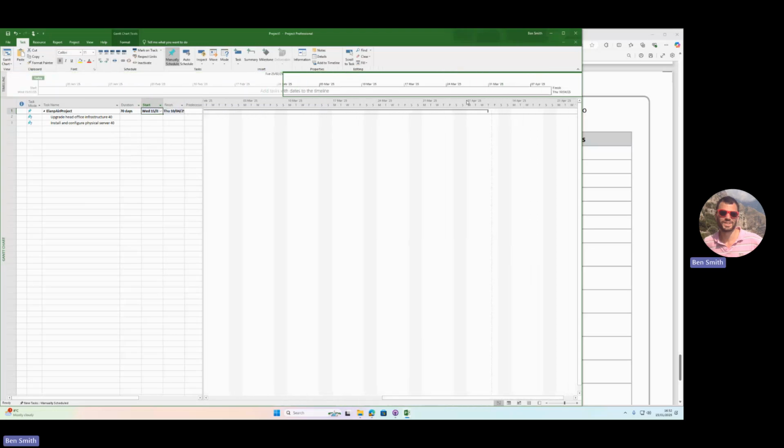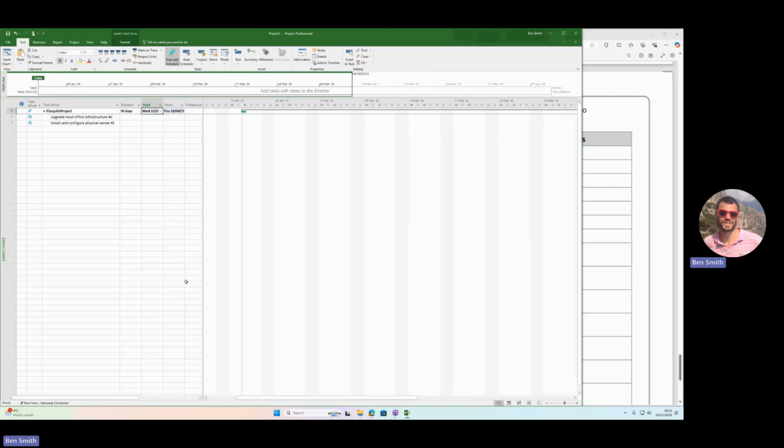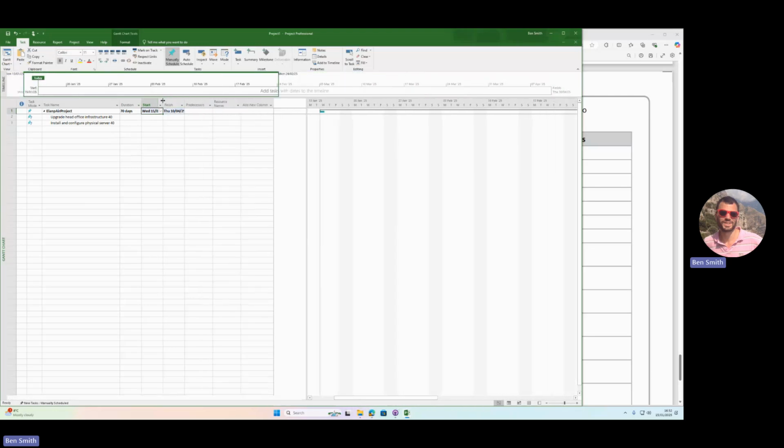And you can see here that it finishes here, 10th of April, Thursday. It will automatically skip out those weekend days because they're not part of the working week. That is done automatically for you by the software. And that gives you an overall task, so you can see that you've made sure all these tasks fit into it.